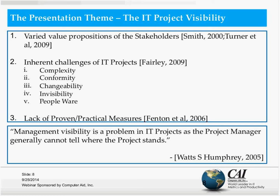For example, I was consulting for a company called Airliquid in France, and the manager asked me when I could deliver a particular object. I was in touch with a developer in Bangalore, India, who was ready with the design, had tried out the code in the sandbox, and said he would deliver it in two days. But when the manager logged into the development system, he couldn't see a single line of code written — so he mocked me, asking how delivery was possible in two days. In a construction project this analogy might work, but in an IT project there are many activities happening in the brain or outside the system that cannot be tracked. Visibility — or invisibility — is a critical issue in software projects.